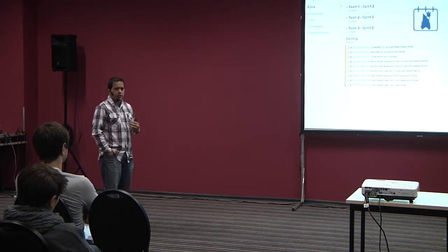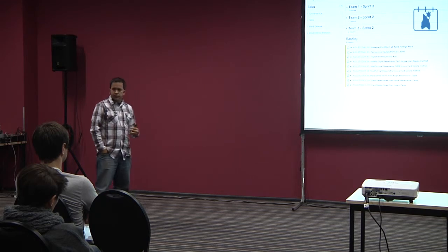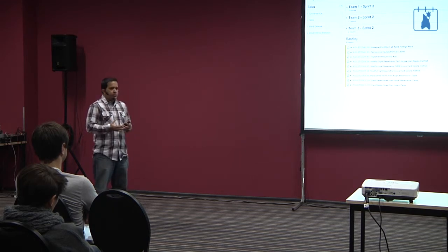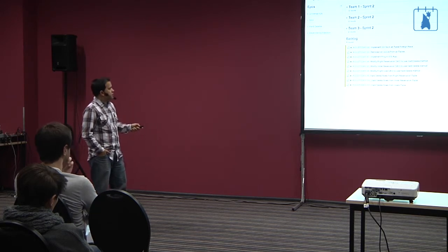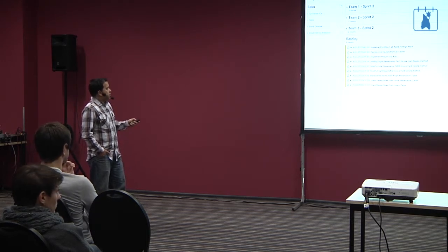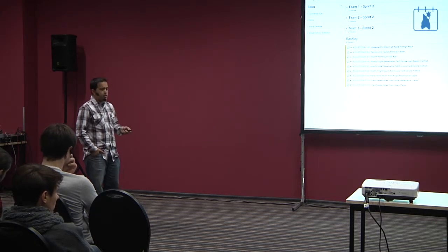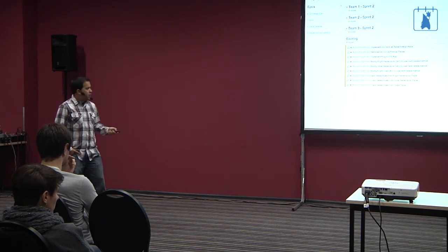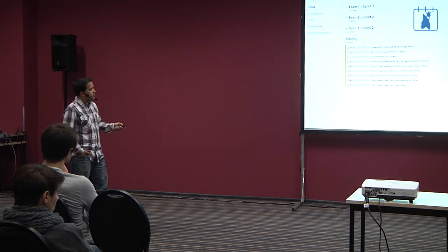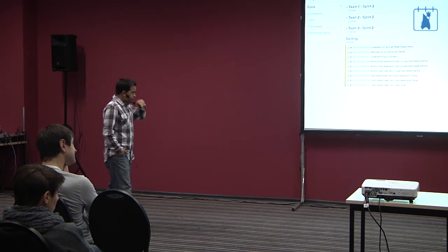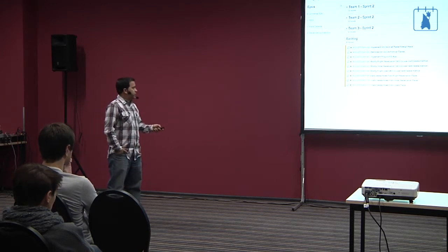that this is my priority. I want to do universal IDs before I do my hard deletes and so forth. After that agreement has been made, I can go in and create my stories that are specific for those tasks and map them to each one of the epics. Right now I have 3 teams working on some stories, but when the next sprint iteration comes and I go to my story grooming sessions, I will bring these top stories here to be voted. These have been voted here, and those are the point estimates. So at the next sprint planning, it becomes very obvious to say, okay, what are the things that we're working on next?